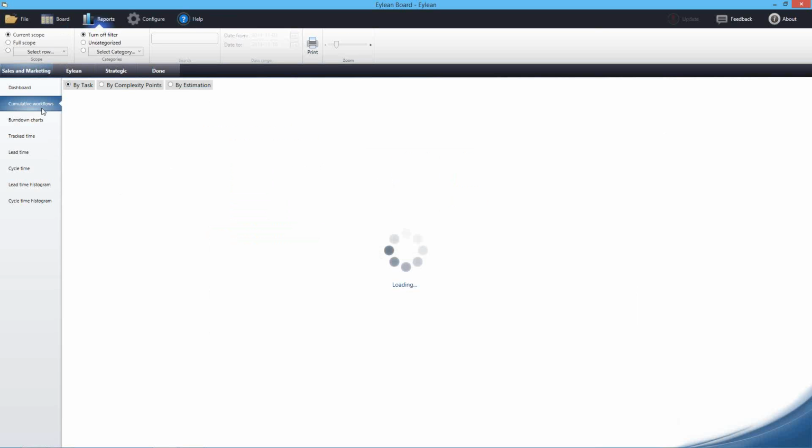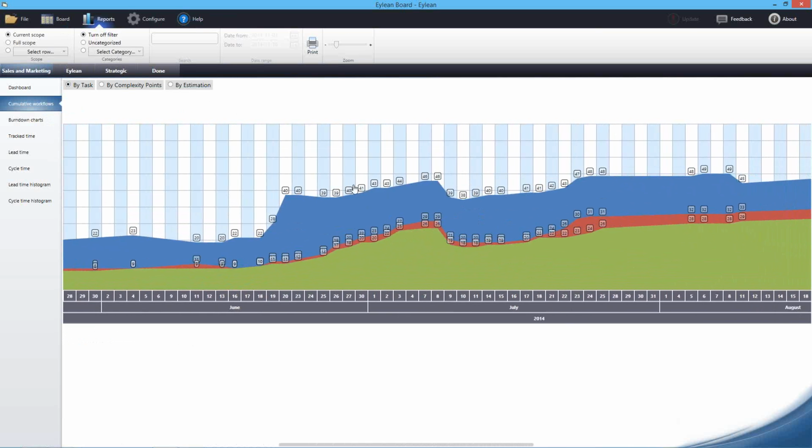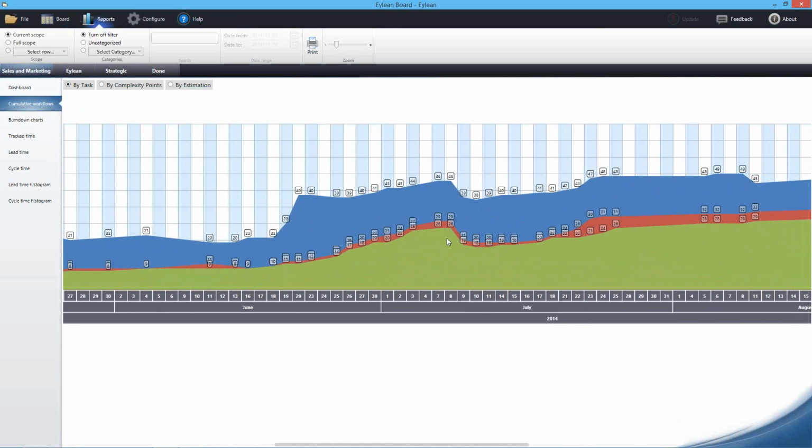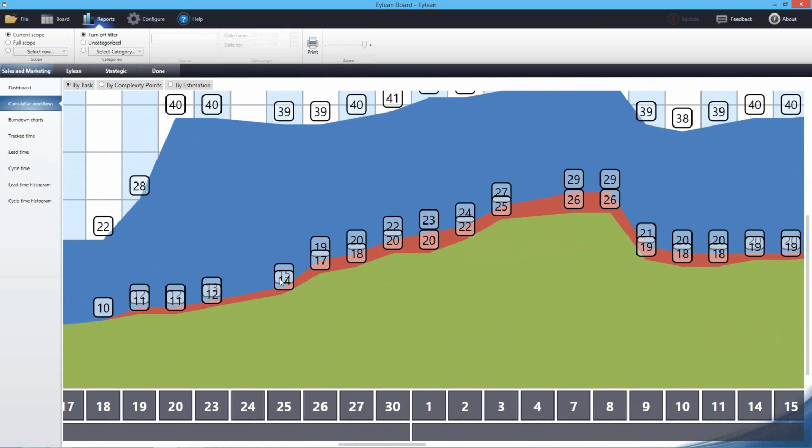So the first one we encounter is the cumulative workflow diagram. It's a thing that comes from Kanban. In abbreviated mode, it would be CFD, and it shows us our speed, how much items we produce day by day. And in here we can see this red line, which is our capacity, and we can always see days. Let's say we produced from day 25 to day 27 an amount of items. Why? Because there were 15 items in production, 14 completed, and then we had 18 items.